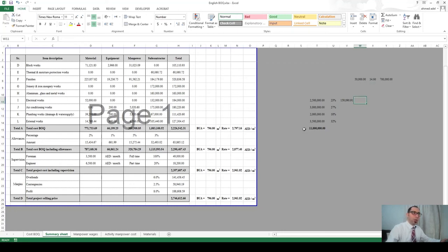in 14 months. So if you can see here, for this project, I have considered a percentage from the cost that I calculated for this project to cover me here. I'm considering something like 141, and here you see, guys, a project similar to this one, because you see 2,700,000, and this project is 2,500,000, almost the same, guys. So I'm assuming a percentage of the cost that will cover this amount, because this project should bear from my 14-month expenses. I should load an amount of 159,000 in here to pay for whatever I am doing in my head office to serve my jobs or my projects to run.